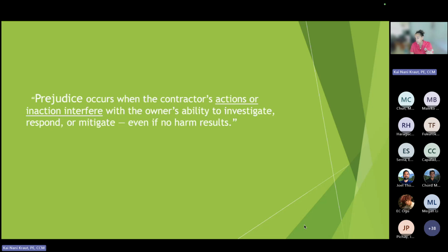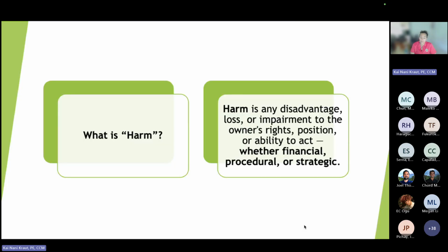I think one of the other ways this happens a lot, although it might be a similar situation, is when the contractor doesn't turn in a cost proposal in a timely manner, and then they proceed with work, and you think it's going to be within a certain realm, and it comes back, just like I'm saying, 10 times, 20 times the cost anticipated. Then they've prejudiced the situation and taken away your ability to mitigate, make other decisions. Like I said, cut the scope, have another contractor do it. There are all these things that we could do.